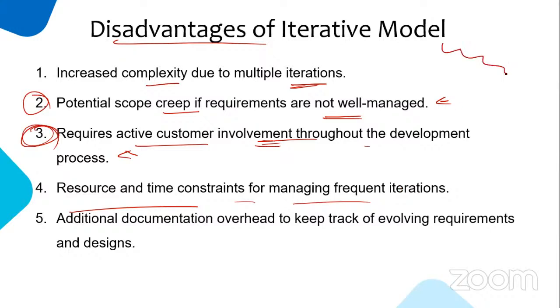See, in the waterfall model, development will be there, QA will be there. While doing development, the QA team will be free. While doing testing, the development team will be free. This is something in real time. Once I worked for like 3 months, I was simply sitting idle because development was going on.